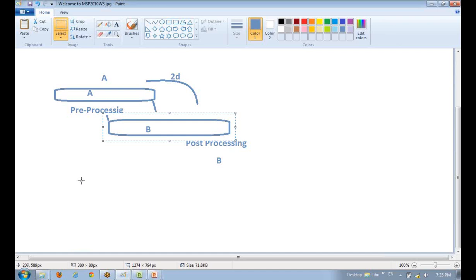You want all the material to be procured before you configure them, but you don't wait for everything to be there on the site before you start configuring. So suppose A is procurement and B is configuration. Even if some material has come which is configurable and is fairly independent of the material still to be procured, you can start configuration work.